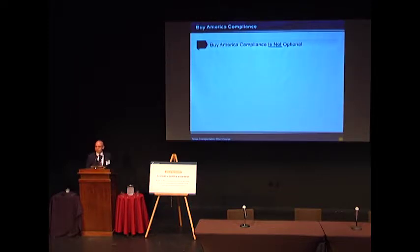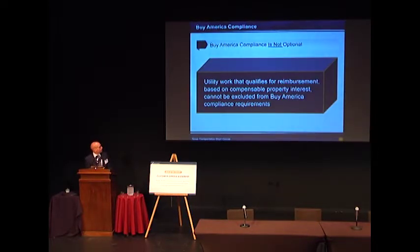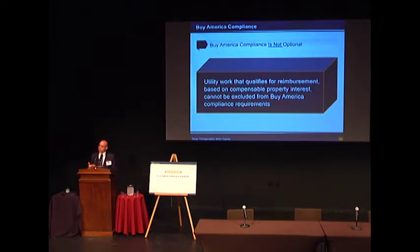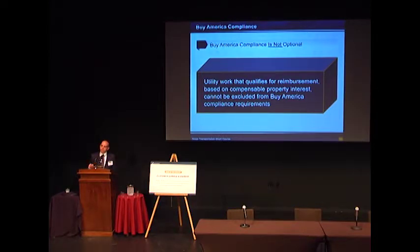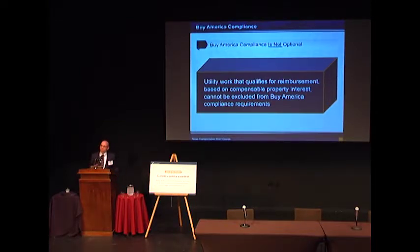Buy America compliance is not optional. Buy America requires that utility work that qualifies for reimbursement based upon property interest cannot be excluded from these compliance requirements. At the end of the day, these utilities provide commodity-based services to individual users. If they are not required to pursue these reimbursements, TxDOT or the Federal Highway Administration has forced the utility to incur additional costs to make an adjustment we could not avoid. The government — state or federal — does not want that cost passed on to those end users. So these reimbursements are available for that purpose.